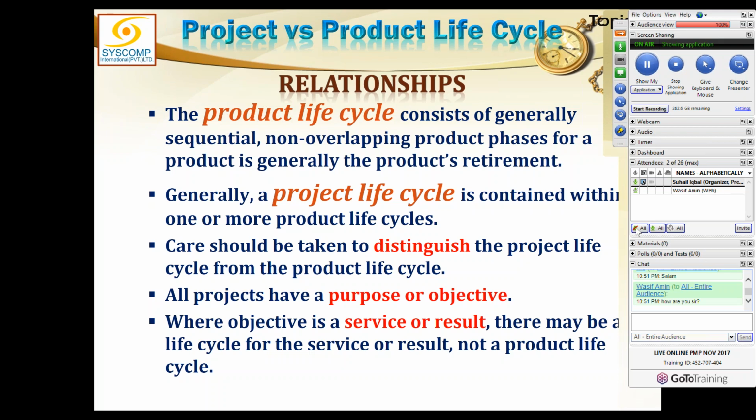It must start at some point in time, and it must finish at some point in time. So this is just natural. If somebody says to me that their project started right from the feasibility, I would very much agree with that. But then I would ask him to give me the charter before the business case was ever created, before the feasibility was ever started. So if you want to add that conception period into the project life cycle, then the project has started at that time, so you should include it as a phase.